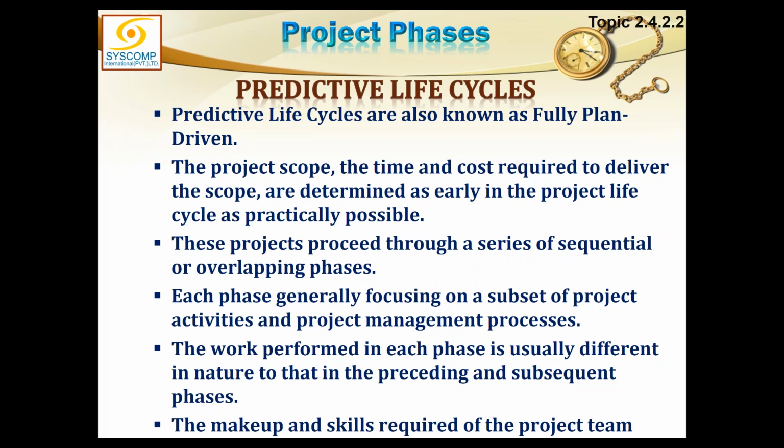You will learn along the way. This is something in between predictive and adaptive. Generally you know how to fix a radar. The general picture, the steps you have to go through, you generally know them. But the specifics will come later, and when they come, we will plan them in detail. This is also called progressive elaboration.